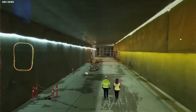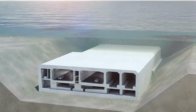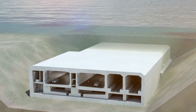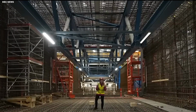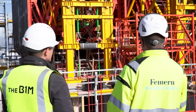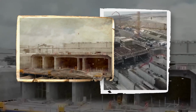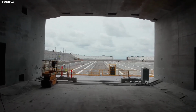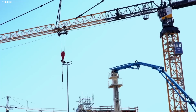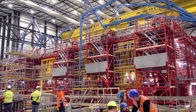Official project updates say the tunnel is being built from 79 standard elements, each 217 meters long, plus 10 special elements that will contain the tunnel's electrical installations. Each standard element is made up of 9 segments, cast in an assembly line process inside huge production halls near Rødbyhavn. This is not a one-off construction site improvising every step. It is industrial manufacturing on a mega-project scale. That changes the whole feel of the project.